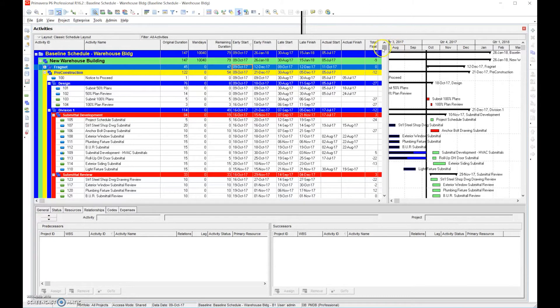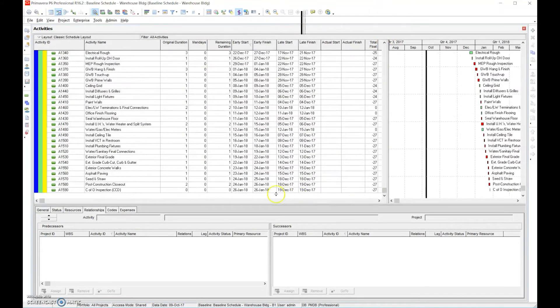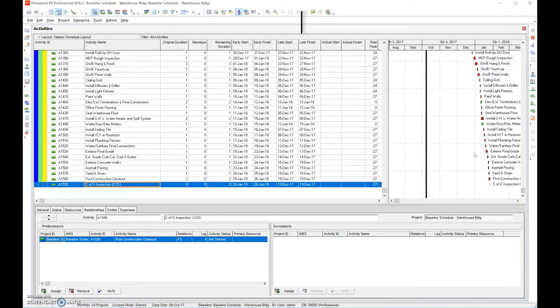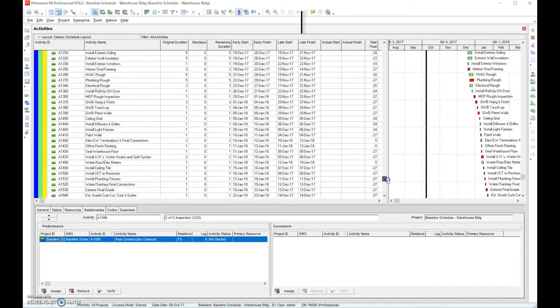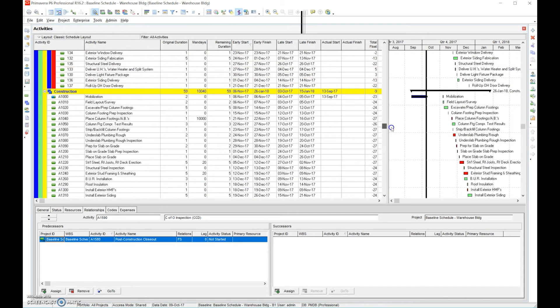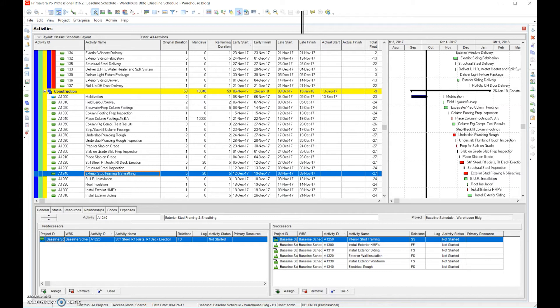So what we need to do first and foremost is we need to go down to the very end and look at the CCD. Okay, we have a negative 27 days, which shows us we're 27 days over the contract completion date. So we need to pull back 27 days. So we want to go and we want to look for opportunities to do that. We want to look at activities that have long durations, right? Longest duration is possible because they have the greatest opportunity to affect the critical path, which is longest path to network.